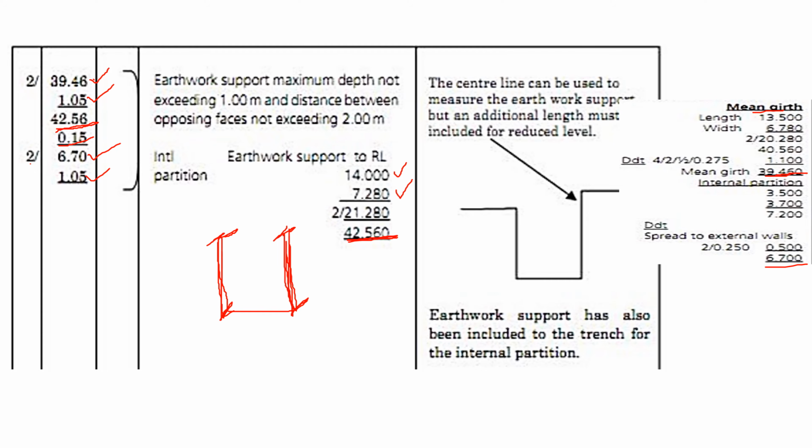So if it was a site, we shall support all the soil that is not on the ground level. We have reduced the level by 0.15, so we go round the side, then we multiply by 0.15. Then for the trenches, we take both sides of the trench by taking the center line times the height, multiply by 2. I hope that is clear.